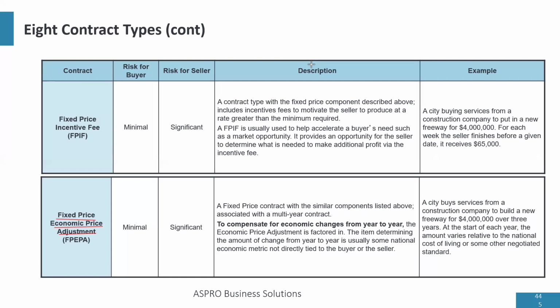It might mean that they're managing the schedule more efficiently than planned, because part of planning a schedule includes putting buffers. And if we don't need the buffers, the project is going to finish ahead of schedule. I hope I answered your question, Faith.